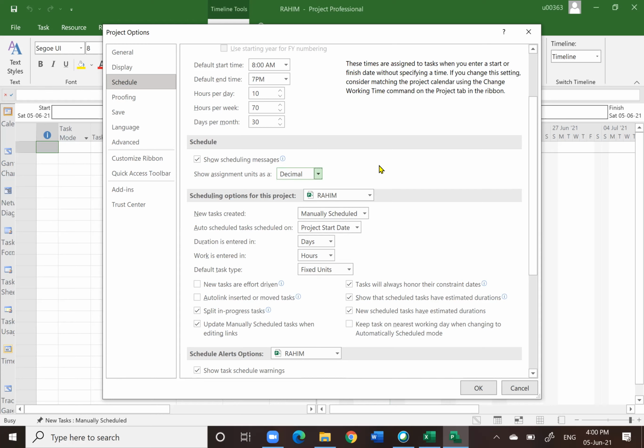How could a worker be 0.5? Half a worker. What does half a worker mean? Half a worker or 50% simply means that the worker is going to work only part-time, maybe 4 hours instead of 8 hours. Okay, so when we start, if you want to learn, then don't use the percentage. You might get confused. Just use decimal.